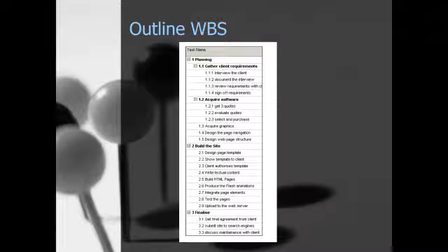And so that's one thing that this has that's a little bit different. If you're using a Microsoft Project tool and you're entering this into your task sheet, you can actually automatically have that created for you, so you don't really have to worry about the formatting of that. But basically the outline has the main categories of work. So the buckets called planning, building the site, and finalizing the site. But in these buckets of work, you can't really assign time or an owner because planning is just too big.